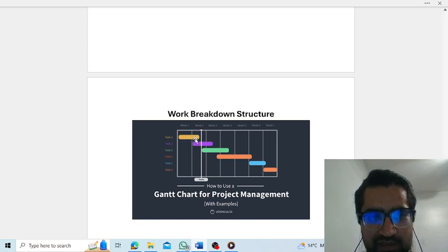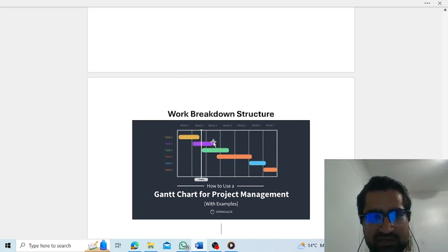So if the first task is dependent on the second task, and maybe the third task is dependent on the second task, if they are dependent on each other, then it follows the critical path. Because if anything stops or is broken, then the other things don't work. So you need to have the criticality of this path, and if anything is delayed, the project deadline will also get delayed.